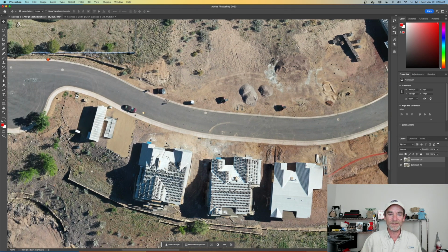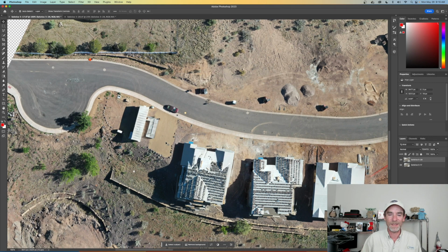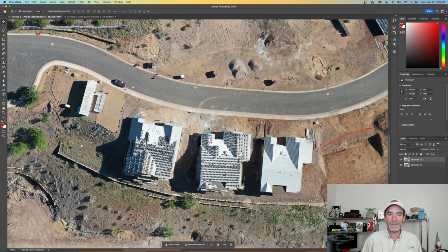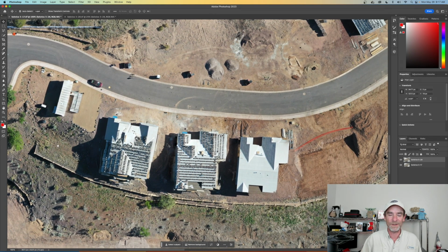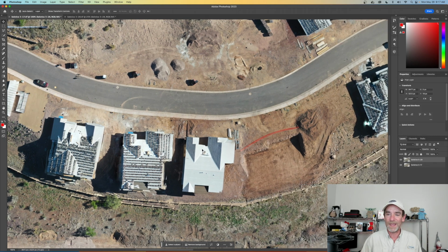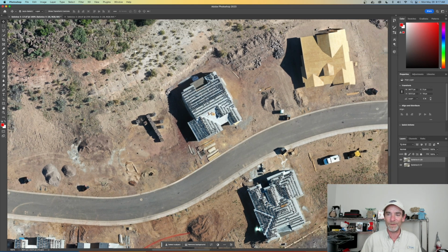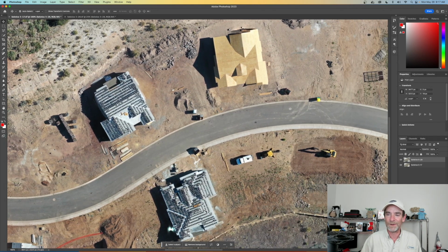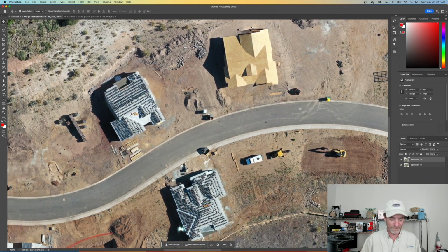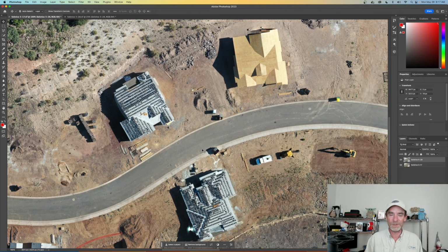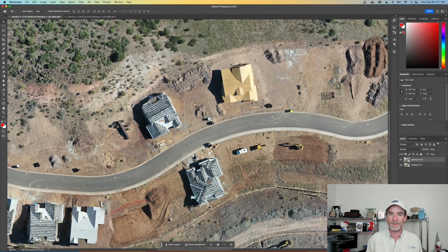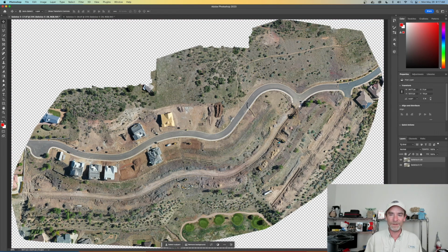They're just using these as a reference so that they can see what's happened on their build site, to make sure that the rooftops are getting closed up on time, that the walls are going in on time, that the newly graded sites are going to be prepped soon for concrete and everything. That's the big important reason that people like to see these first before anything else. It gives them a bird's eye view of, okay, we know 2 new structures went up this week, so we're on schedule. I'm going to zoom this back out here.